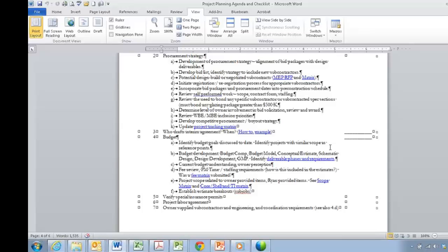Most important, though, is taking the time at this stage, at the earliest stages, to make sure everybody has a common understanding of the budget, and that is based in a common understanding of what's included in that budget and what it's based on. We often find that when we're in pursuit and then going to kick off a job, there's that outer 10% that sometimes, oh, I thought you had this, or I didn't think you had, or I thought you had that. That common understanding at the early stages before we get knee-deep in design is very, very important.